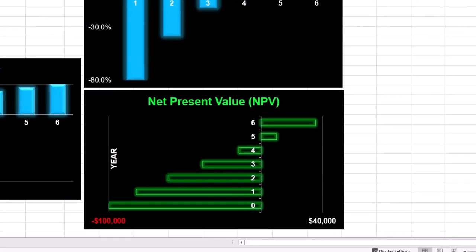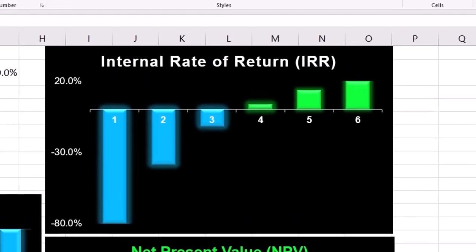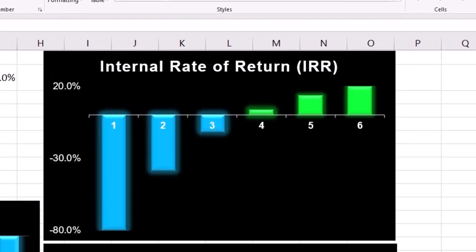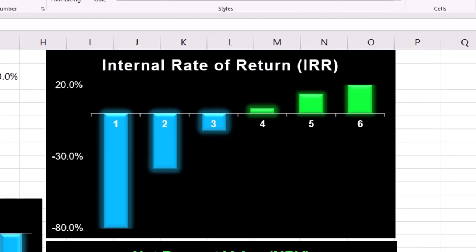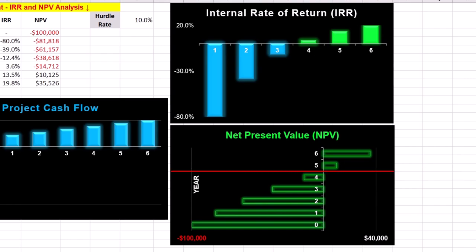NPV adjusts cash flows to account for the fact that money today is worth more than money received in the future. IRR measures the efficiency of an investment by showing the rate at which the project generates returns. It's also beneficial for comparing projects with different cash flow profiles. If NPV is greater than zero, the project exceeds the hurdle rate and is financially viable. NPV identifies the precise point in time when the investment breaks even in terms of time-adjusted value.